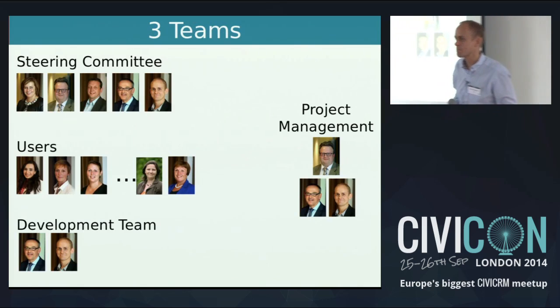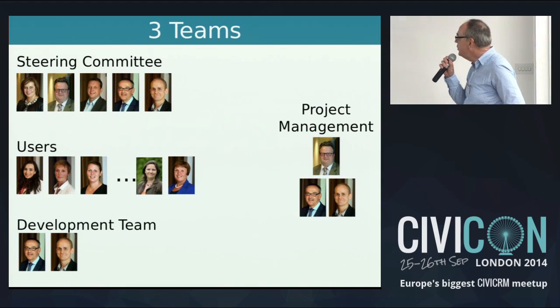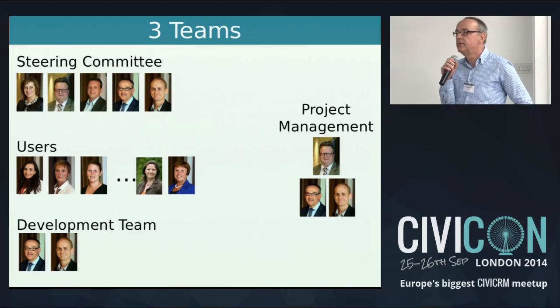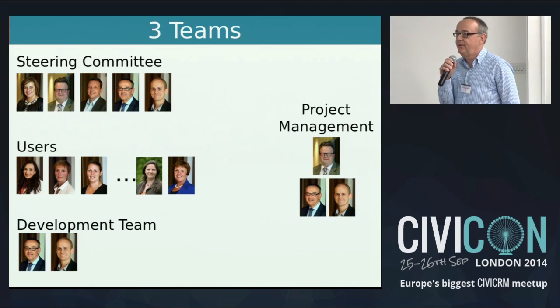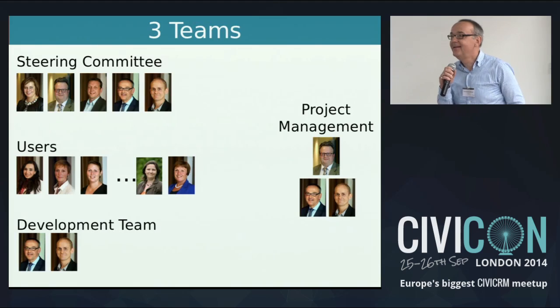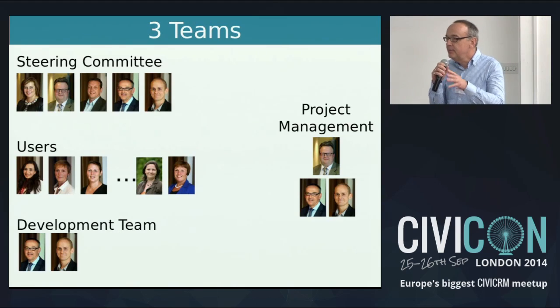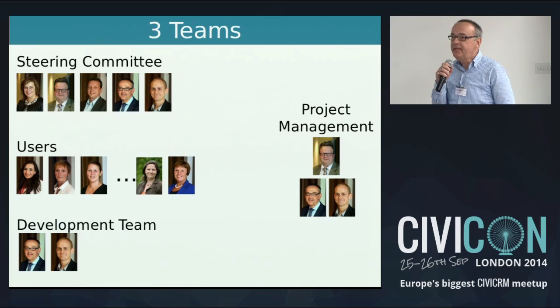When you first started, how long did you plan? And how long did you actually use? It was the CEO who said to us the system had to go live, I think, December this year. But it became 6 months later. We knew it wasn't realistic, yes. But we didn't dare to tell her. So the first step was to say, okay, April, it will become April. And at the end, it became June.